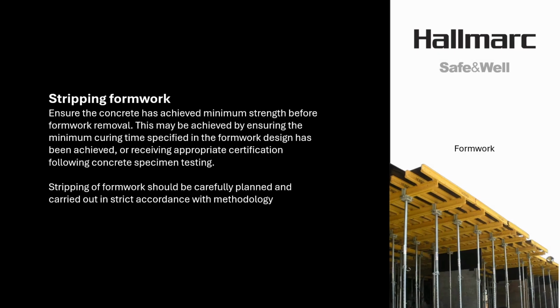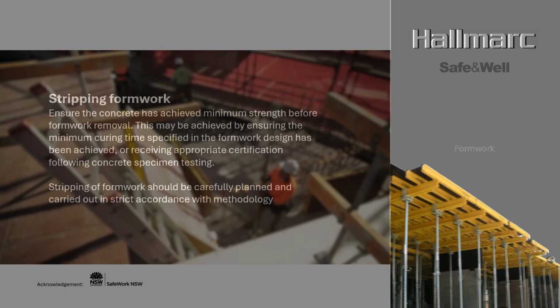Stripping formwork. Ensure the concrete has achieved minimum strength before formwork removal. This may be achieved by ensuring the minimum curing time specified in the formwork design has been achieved, or receiving appropriate certification following concrete specimen testing. Stripping of formwork should be carefully planned and carried out in strict accordance with methodology.